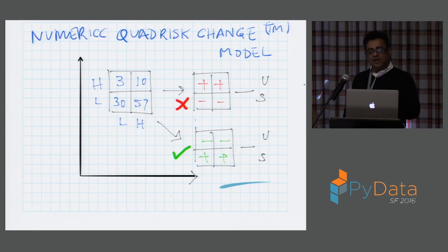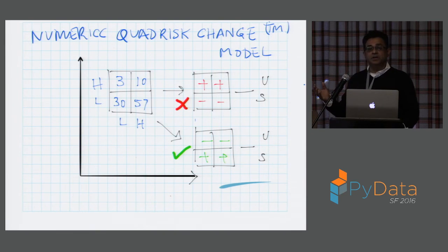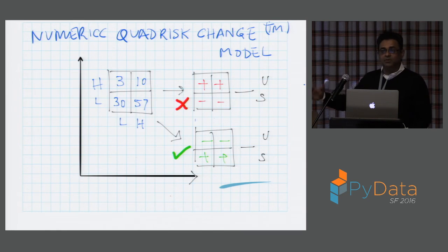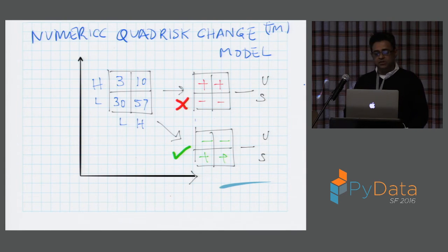So I put some numbers in there. One of the things I found out on many of these projects is that in a typical code base, 3 to 5% of the files have most of the severe bugs. And 80% of the files don't have any severe bugs at all. Some of them don't have any bugs at all logged against them. That doesn't mean that there is not a bug there, but I'm looking purely at history, bugs that have been logged in the past.